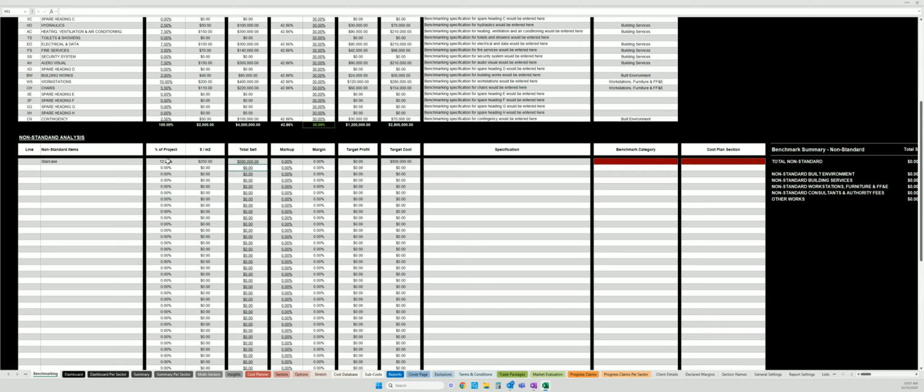$500,000 for a staircase. It automatically says it's $250 a meter, or 12.5% of the target value. You would then add in staircase with features, and then you would add in whatever specification you're allowing under that, or your underlying assumptions.